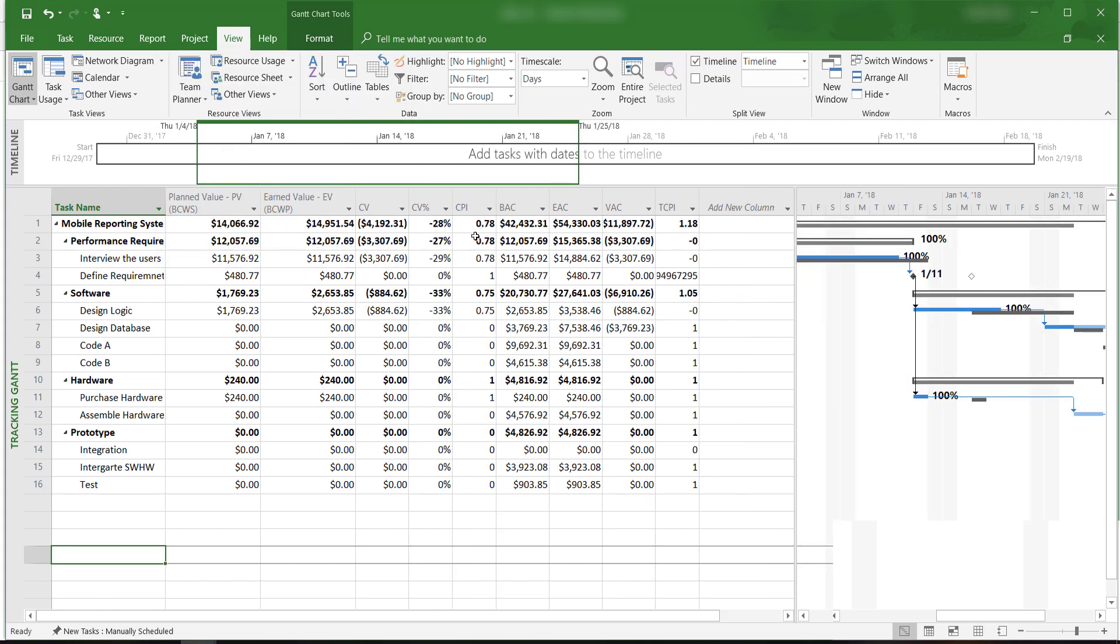Now you can see the CPI along with other cost indicators information. It shows that we are only earning $0.78 for every dollar that we actually spent. If we continue to do this, we will be over budgeted by about $12,000.